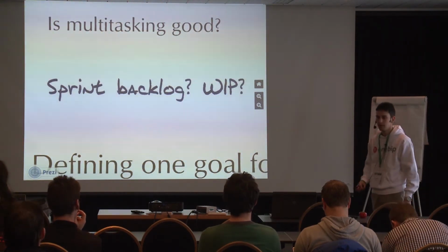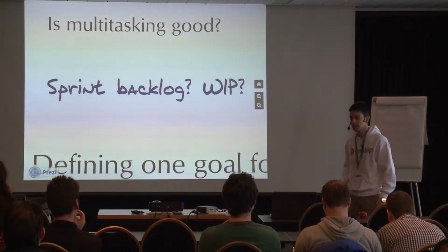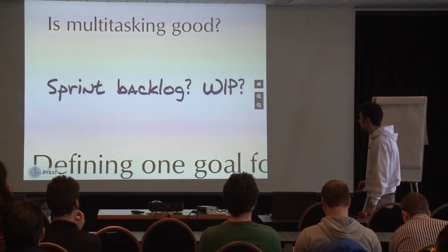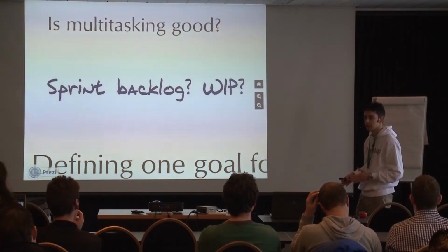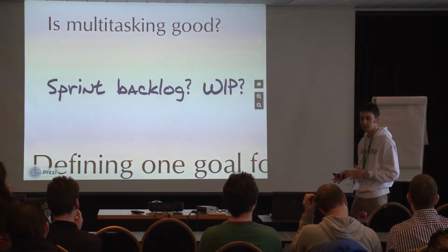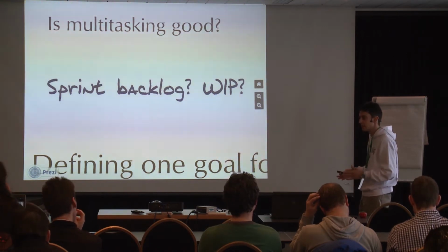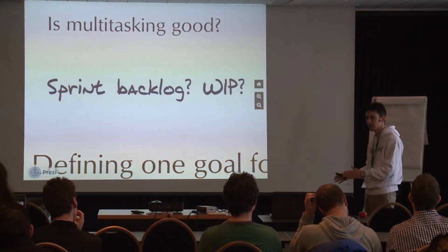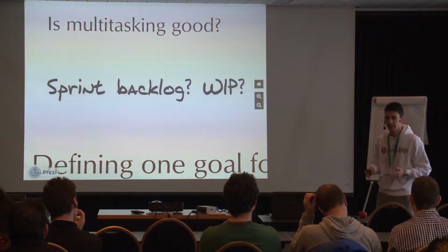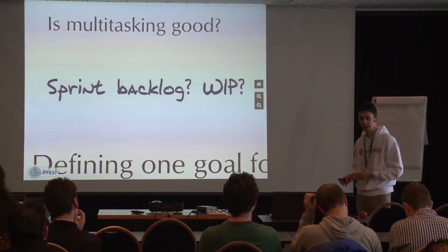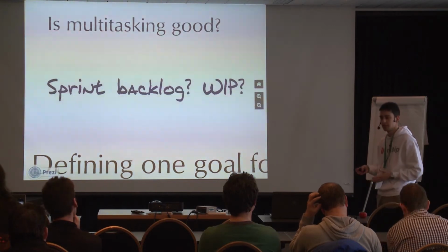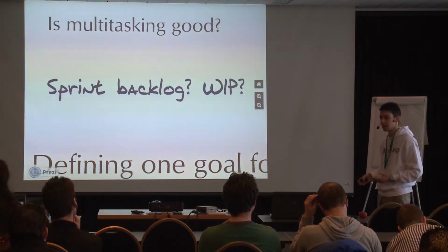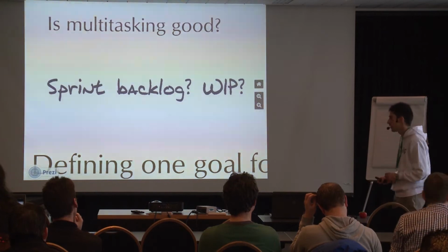This should remind you of some Scrum concepts like the sprint backlog. While you're working during a sprint, the scope of what you're developing is fixed. There are some stories in the backlog. This cannot be touched until the 2 or 4 weeks iteration is finished. So you can't juggle between too many features in a sprint in Scrum because your backlog is fixed.